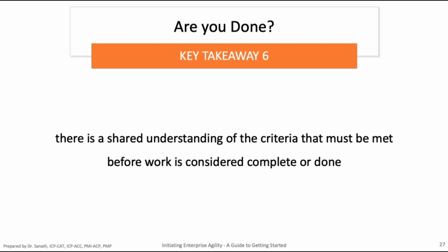But if you're doing, say, software development, the definition of done could be different, because if you're doing a function like login, then that login must have been tested first before it's done, as in done, right? Because if it just works on your screen and you're so excited, but it's not tested, that's not done. So this is what I mean by the definition of done. Now I'm just checking, is this an idea that is workable in your various settings?